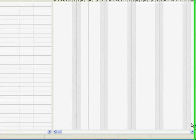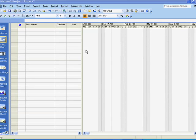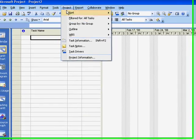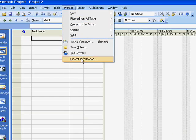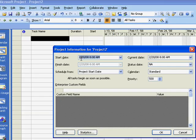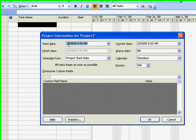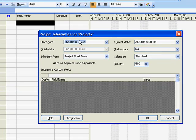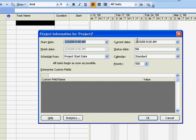We will demonstrate that entering these two variables is essential before entering any task data. In order for Project to correctly schedule tasks, it needs a starting date for the project. To set this date, on the menu select Project, then Project Information.